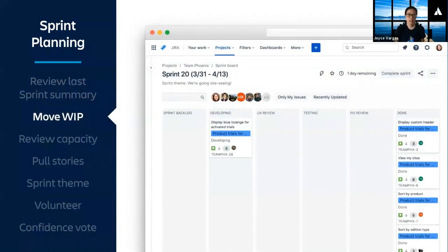Next, we review any stories that were incomplete or work in progress. Depending on their priority, we'll move them back to the product backlog or roll them forward into the next sprint. We keep the points with the story, meaning we don't give ourselves credit in the last sprint for any incomplete work. If we roll the story forward, the points will apply to the next sprint.